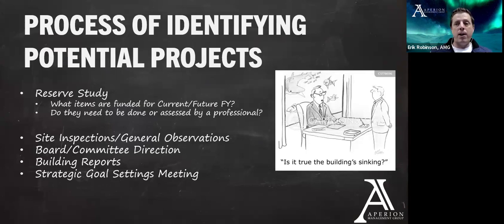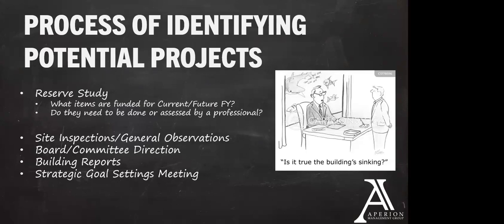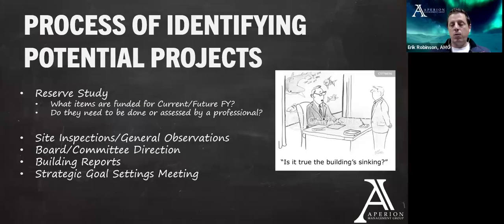That needs to be thought about well in advance because as all of you know, working in Central Oregon, the list of reliable, good vendors is not as large as other metropolitan areas, and their schedules fill up very, very quickly. So we need to be on the ball when we're looking at these things.